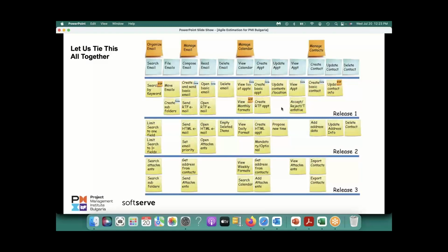So that gives you a little flexibility in the planning, and that is what is to your advantage. So you don't say, okay, this is the effort. You say, this is how many story points we are going to deliver, and they are coming from these stories. And towards the end of this, you go and do detailed planning for this, and then detailed planning for this. But after release planning, this is the kind of chart that I'm looking for. You have a very clear idea about all the releases and what goes in each release.